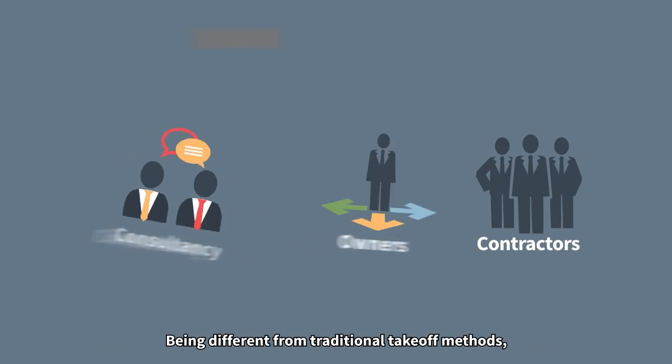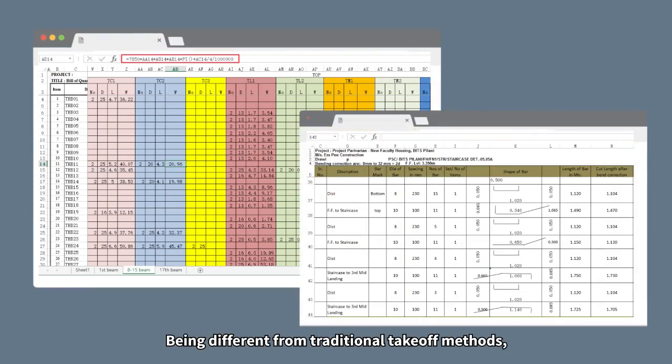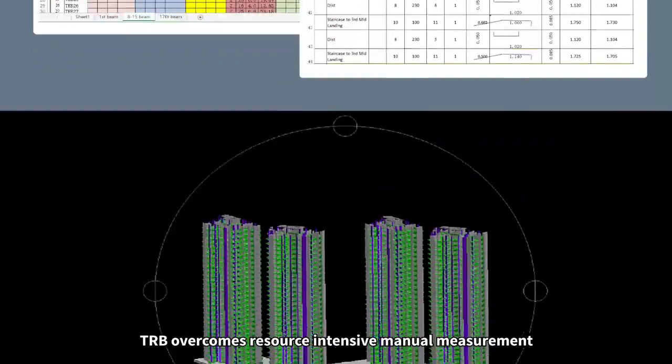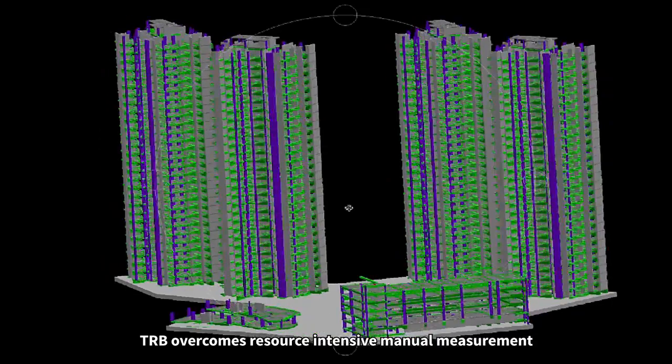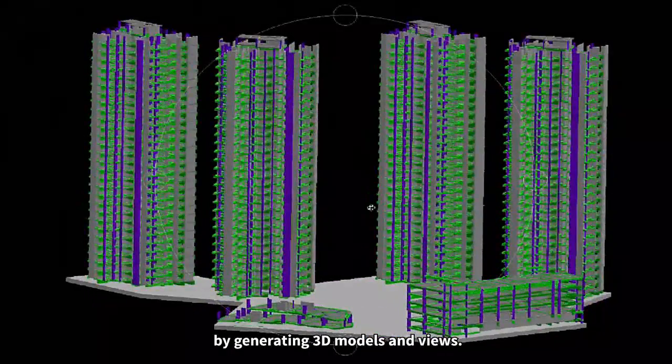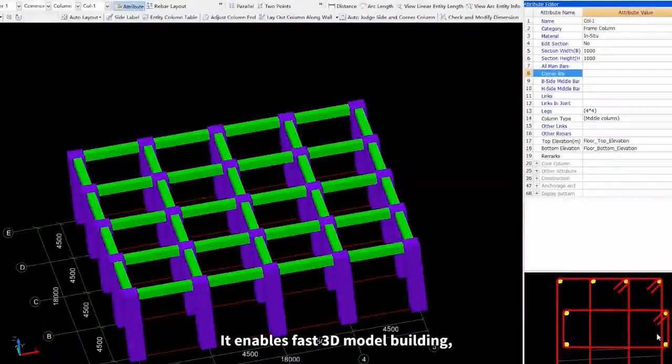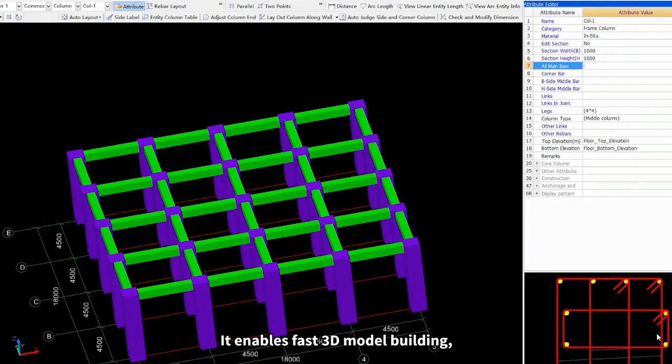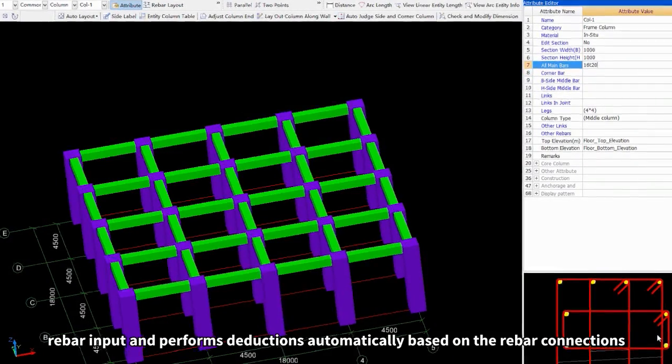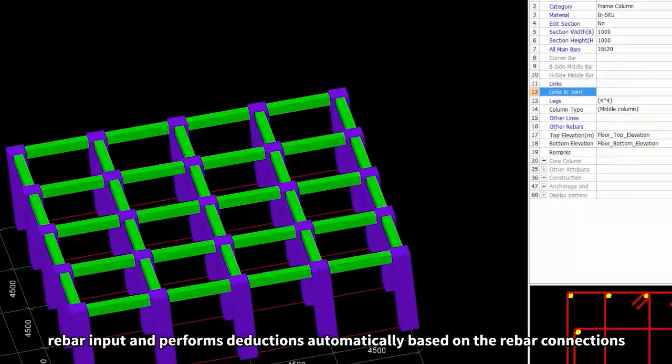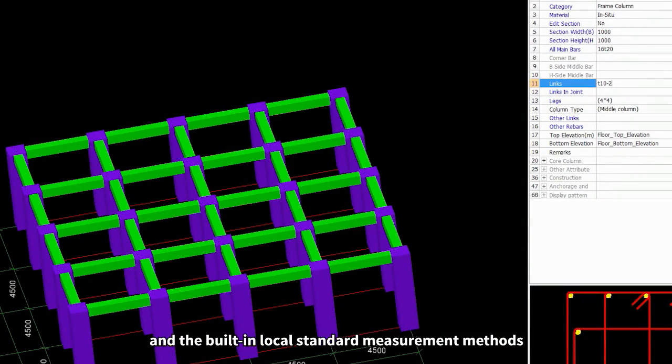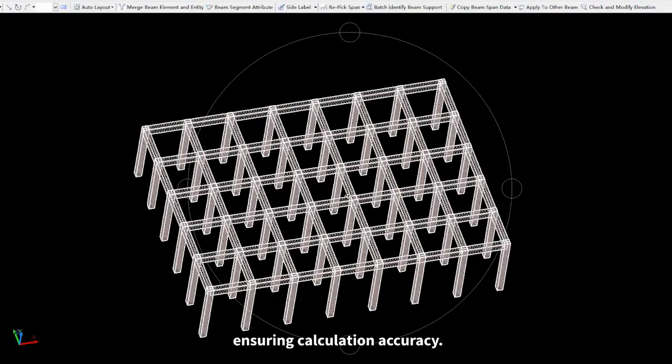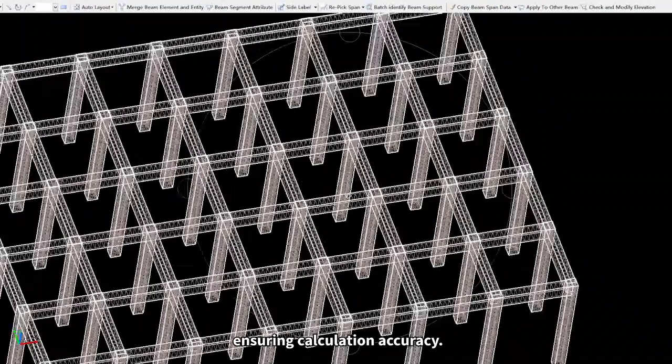Being different from traditional take-off methods, TRB overcomes resource-intensive manual measurement by generating 3D models and views. It enables fast 3D model building, rebar input, and performs deductions automatically based on the rebar connections and the built-in local standard measurements methods, ensuring calculation accuracy.